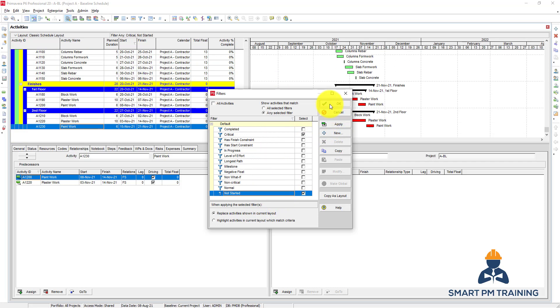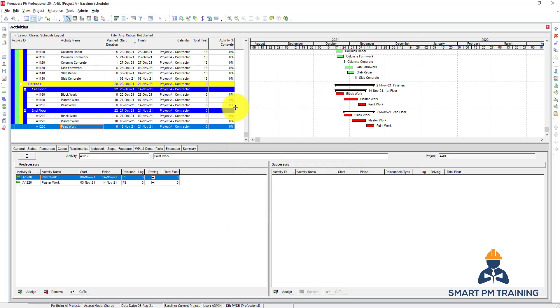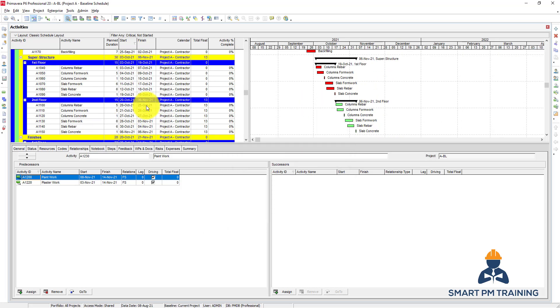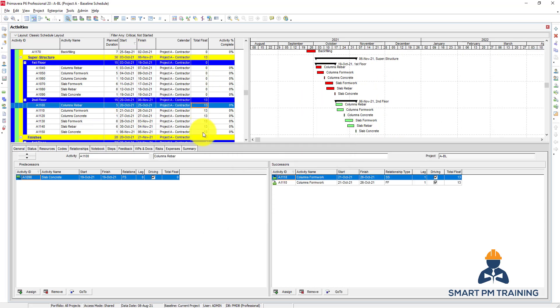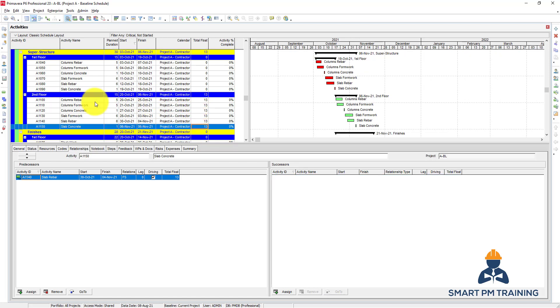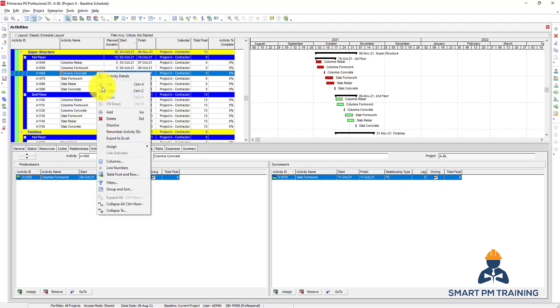Click Apply and it will show all critical activities, and also this group of activities — they are not critical but they haven't started yet, which is why Primavera shows them as well.